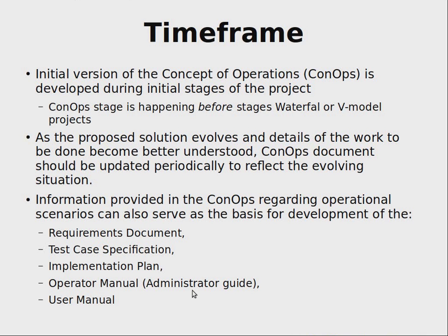And in many cases, this concept of operation is developed in several iterations. As I told you, a typical iteration is the following. You describe a very rough concept of operation as a request for proposals. Then you get back proposals to these requests with more details. Then you may use these more detailed proposals to actually ensure that the money you may or may not have in the future is guaranteed, etc. And then you update it even more.